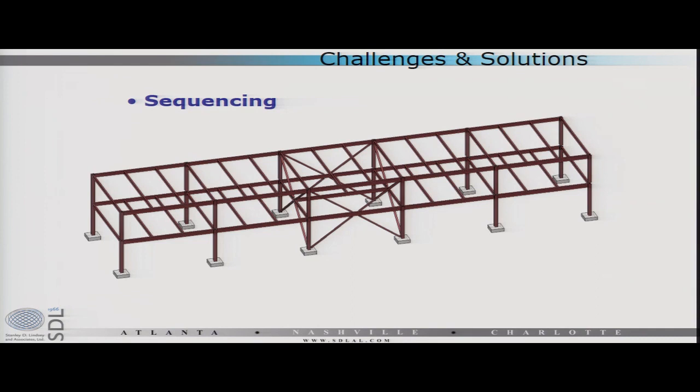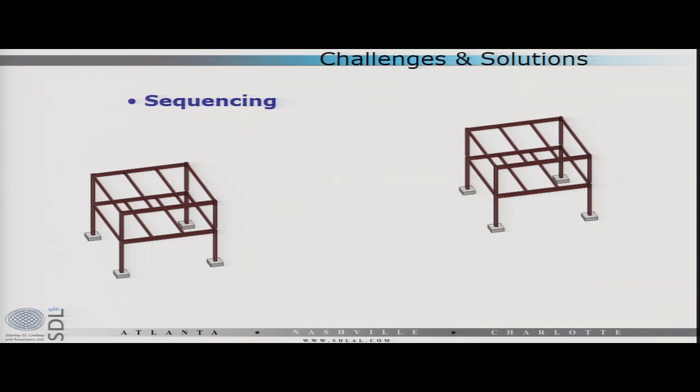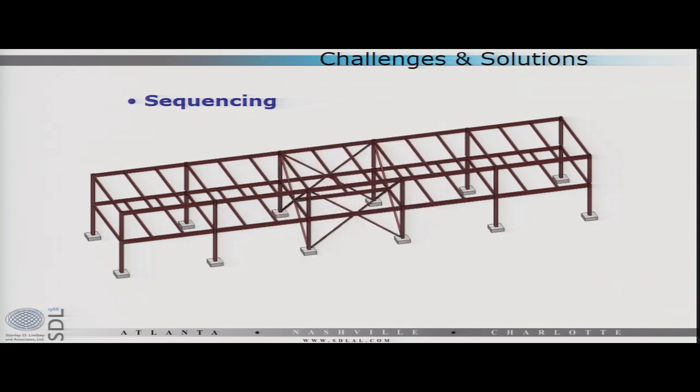As a general contractor, where do you want to start? From the end and move all the way. With my luck, guess what happens? They start there and they move inwards, right? This is exactly what happened on a major building that we designed, that we were the erection engineer on, just on a bigger case. So if you can get involved with the GC early enough to affect their sequencing, and